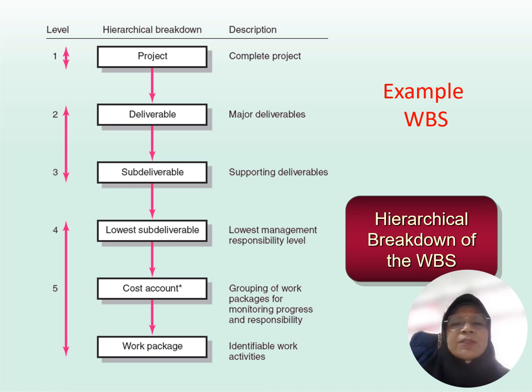For example, the project is actually the complete project. The deliverable is the major deliverables. Sub-deliverables are the supporting deliverables. The lowest sub-deliverables are the lowest management responsibility level, where cost account and work package consist of grouping of work packages for monitoring progress and responsibility, and also identifying work activities.